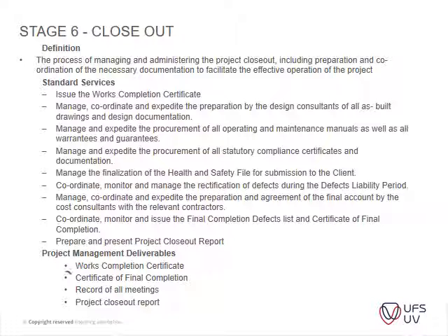So you have your works completion certificate, certificate of final completion, record of all the meetings, project closeout report. Very important, this project closeout report. It just covers yourself, whether the client was actually happy with everything that happened, and that there won't be any comebacks later on.